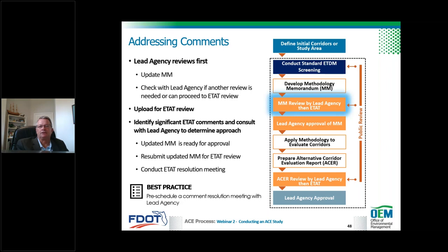After the district uploads the memorandum for the ETAT and public review, then the comments are going to come in, so it's always helpful as well to have a follow-on meeting, if you will, with the lead agency to review and respond to any of those comments received. And certain situations might actually warrant that maybe there's some concerns, maybe ETAT has some questions, so there might actually be a second review of the methodology memorandum that you might want to conduct. In that case, it's often good to get up with OEM, particularly if they're the lead agency, right? And then think about a best approach. Next slide.